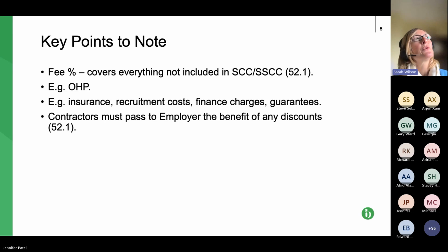The reason for this, and what we'll be seeing, is a number of checks and balances throughout. So the idea, very roughly, is that what the contractor is entitled to be paid, and the subcontractor through the schedule or the shorter schedule, is its actual cost of the items that are being used.